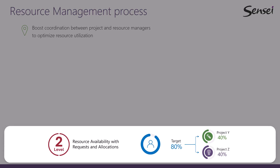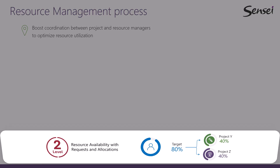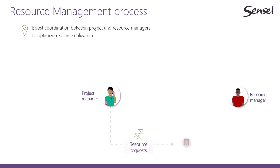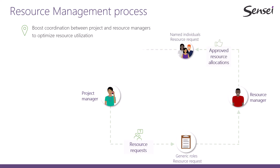Resource management level 2 follows a process that's quite similar to your project budgeting process. The project manager will submit a request for resources needed for the project — often referred to as a resource budget or resource plan. Ideally, the request is for generic roles as opposed to named individuals. If the project is approved, the resource manager or line manager will then select the named individuals to work on the project at an approved allocation level. Then, the project manager can assign tasks to those individuals in the work management tool, staying within the approved allocation level, of course.